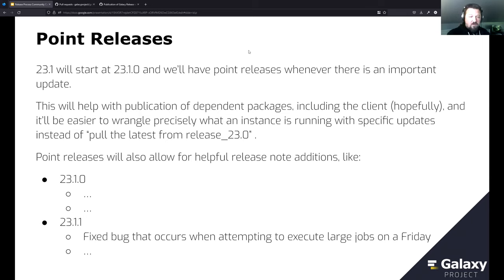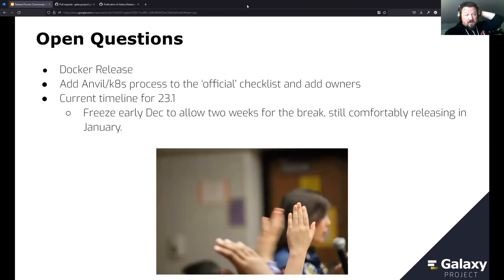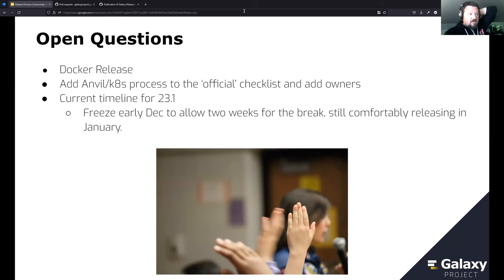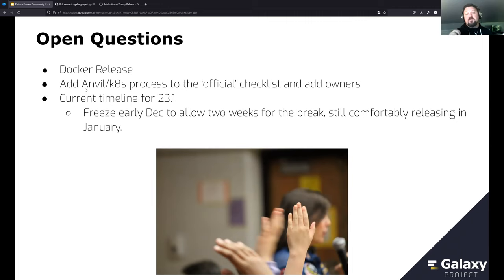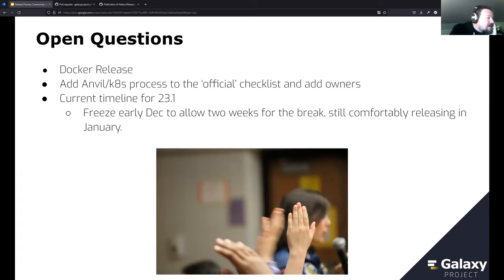Open questions on the release scaffold: the Docker release doesn't seem to have been done in a couple of years, so we should probably drop that from the release scaffold — we've effectively already dropped it, so let's make it formal. Should we also add the AnVIL Kubernetes deployment cycle to the official checklist, with owners for that set of artifacts? The chat seems to indicate yes.